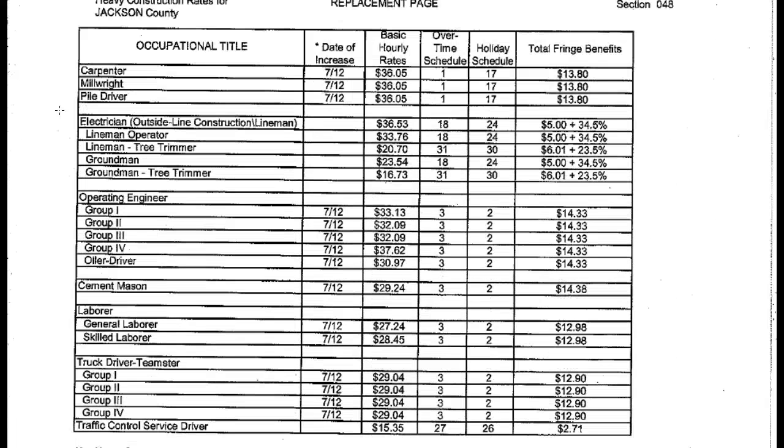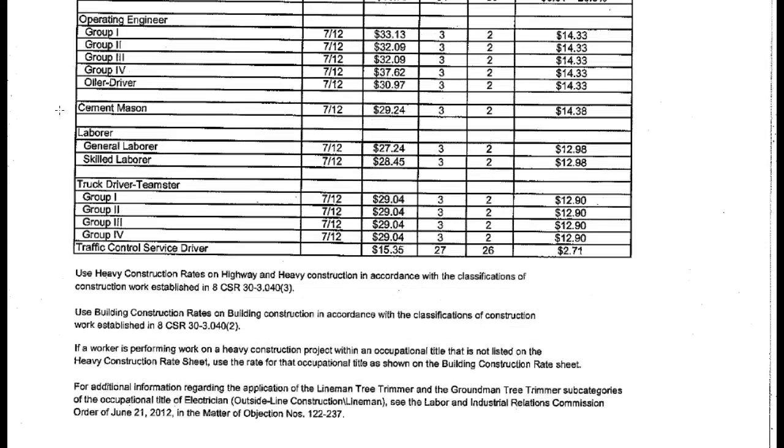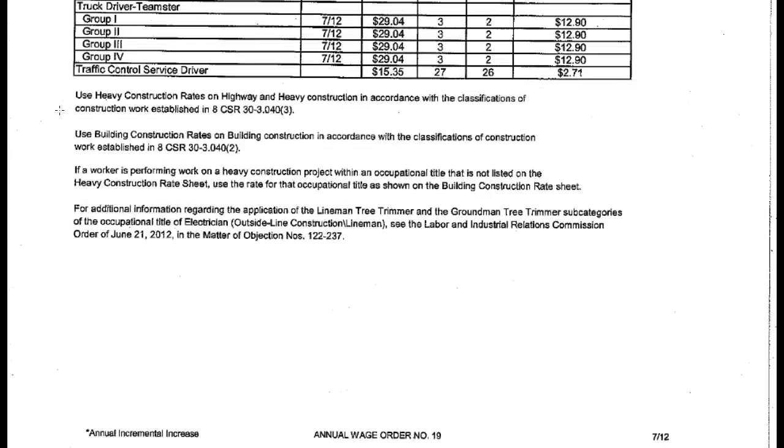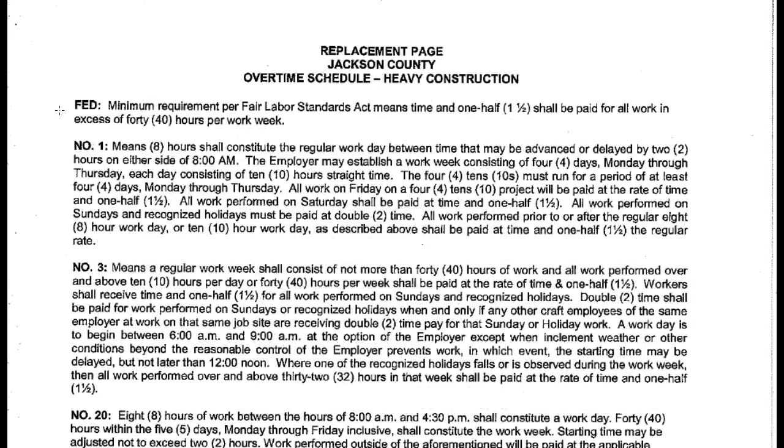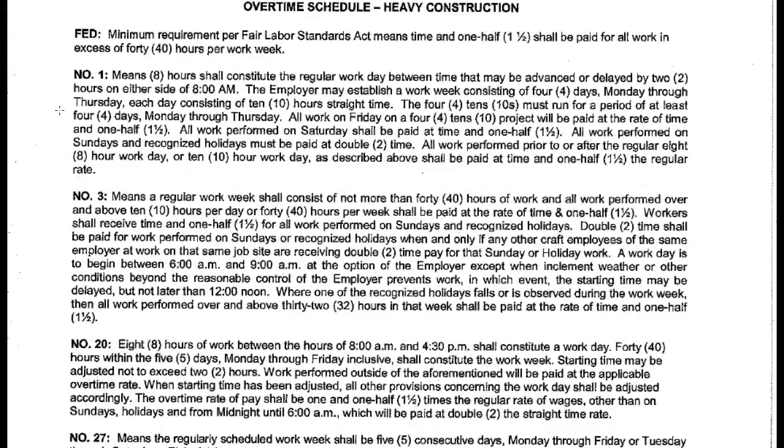And again, the other thing that's in this wage report is changes. It tells you when they've changed, so you can keep track. Again, you have to certify that you've paid everybody correctly every 2 weeks when we do a pay estimate, and so you have to go through and always make sure that you're in accordance with the wage law.